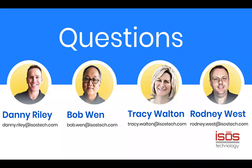Okay, thanks, Bob. Let's see, the next one. So it's about your PI planning and the work that can be done in it. It looks like what happens if all of the work that's planned in a PI session can't be completed in a single PI? So what typically happens is for a given feature, if you take some of the stories and you get them deployed, but you don't get all of the stories that make up that feature completely implemented by the end of the PI, you typically put that feature back in the program backlog.